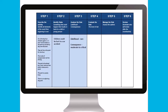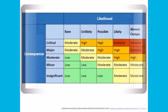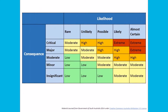Step four involves evaluating the level of risk, which will be dependent on the answers you gave in step three. To assist you, you can utilize a risk analysis matrix. Continuing with the example of children being hurt in a car accident — the likelihood was rare and the consequence was moderate to critical. Therefore, using the risk matrix, the risk level is low to moderate. You should continue to use this process for all identified risks.